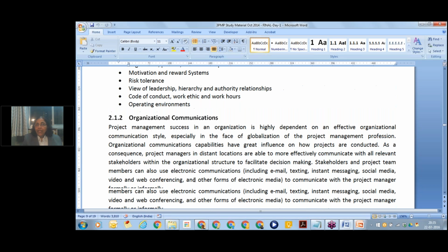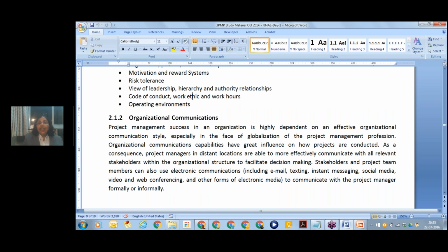One more thing the project manager has to understand very well is communications, how communications happen. See, if your management feels that purchase orders always have to be authorized by two people, anything on and above 5,000 rupees has to be approved by two people, what do you realize? When you need to purchase something, you need to communicate it to two people and get their approvals. So the communication requirement is, you have to communicate with person A who gives level 1 approval, and person B who gives level 2 approval, get it.